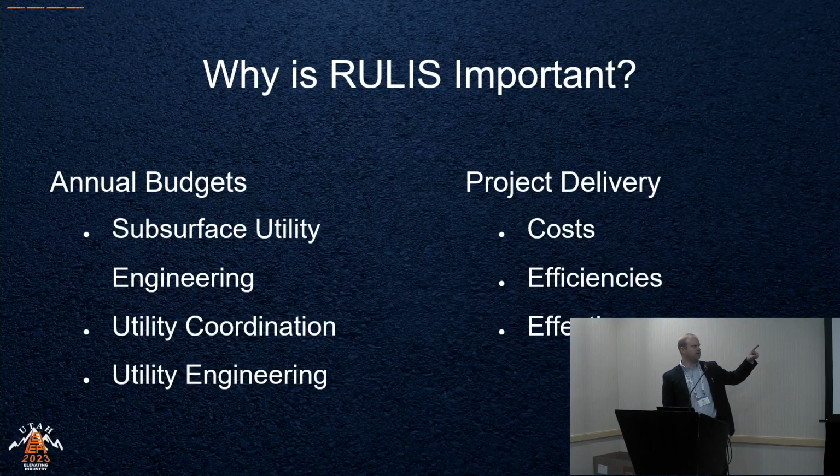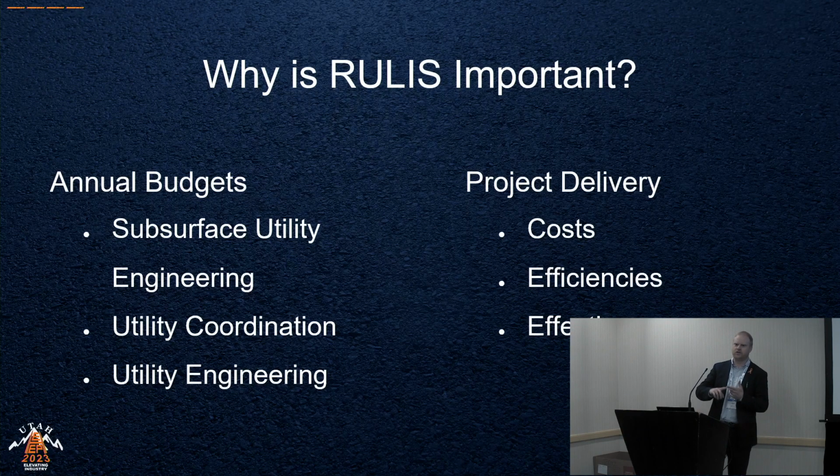Talking about annual budget, fiscal year 24 for right-of-way is $1.5 billion. That includes our acquisition and utility adjustments. We're averaging over the last 5 years about $350 million in utility adjustments per year. We're buying about $900 million to $1 billion in right-of-way. Just to give you a little bit of perspective on what we're doing.